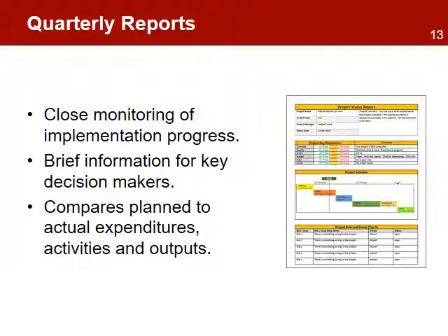Quarterly reports are mostly done for close monitoring of the implementation progress. The information is brief and used by the project team and senior management to make decisions on the project. The quarterly report compares planned to actual expenditures, activities, and outputs. The quarterly reports are also used to update the organization's internal reporting systems and aggregate all the data for end-of-year reports.